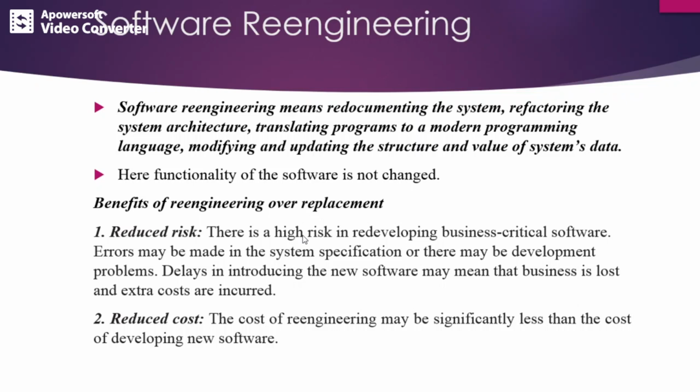There is a high risk in redeveloping business critical software. Errors may be made in the system specification or there may be development problems. Delays in introducing the new software may mean that business is lost and extra costs are incurred.